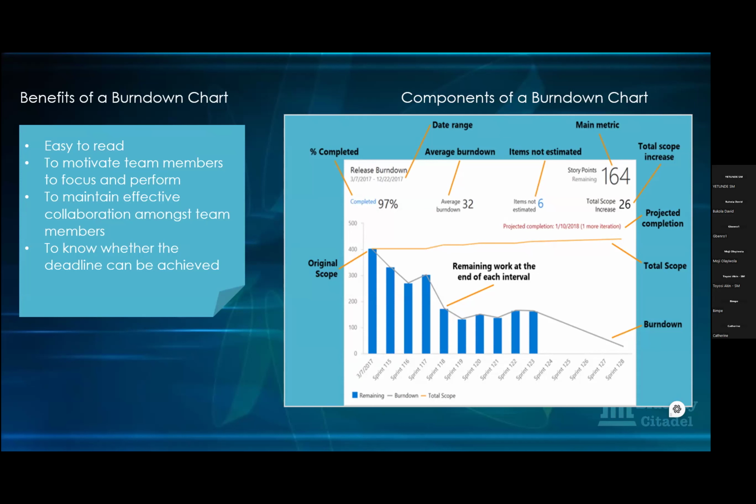But when you sit down as a team to form the team's definition of ready and done, you're forming it for everyone. You're coming and saying for a work item to be considered done, it must have, start putting your checklist in place. The first thing is the story must have the requirement, acceptance criteria, wireframe, if you want it to have that, and everything.